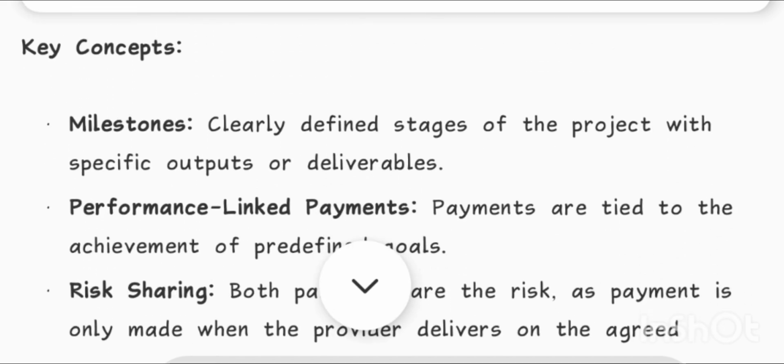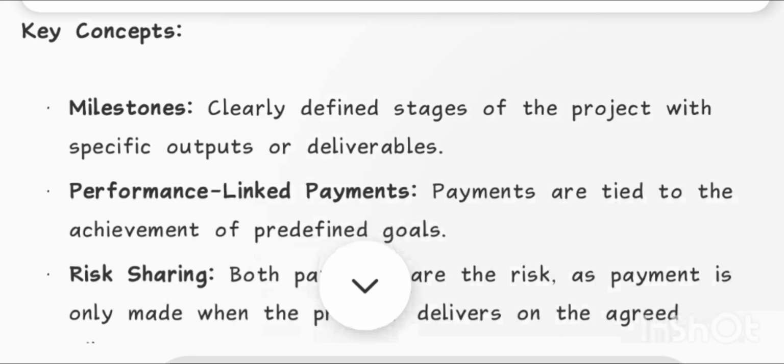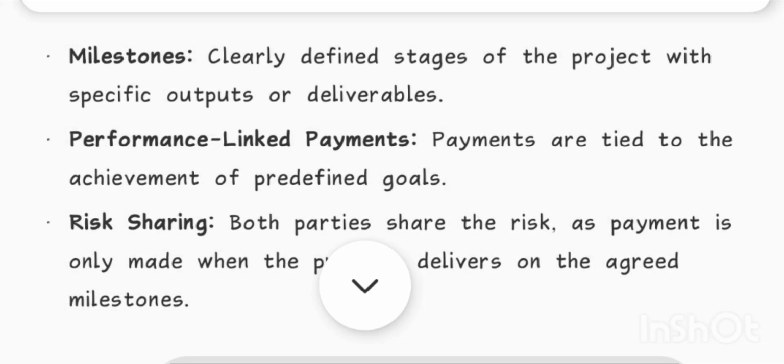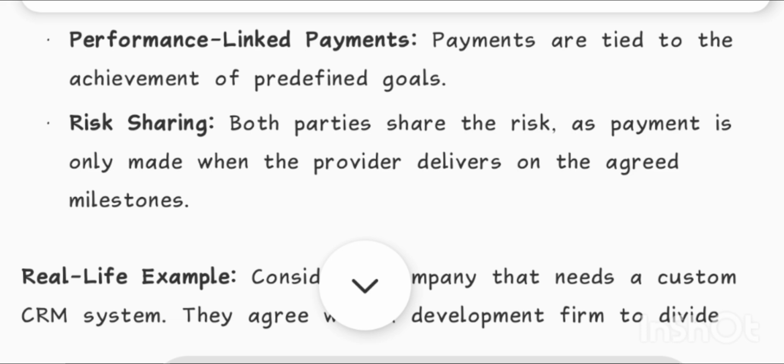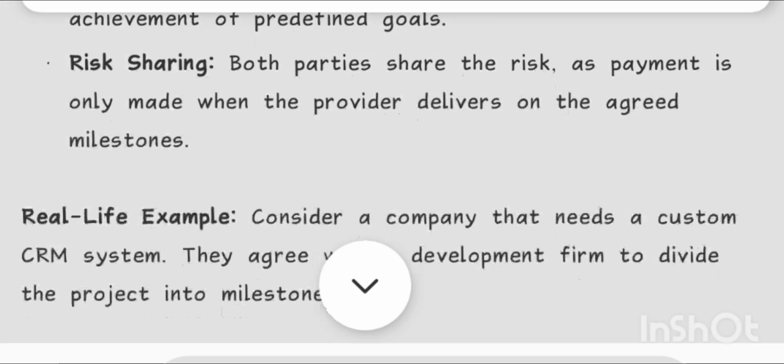Key concepts. Milestones: clearly defined stages of the project with specific outputs or deliverables. Performance-linked payments. Payments are tied to the achievement of predefined goals. Risk sharing. Both parties share the risk, as payment is only made when the provider delivers on the agreed milestones.